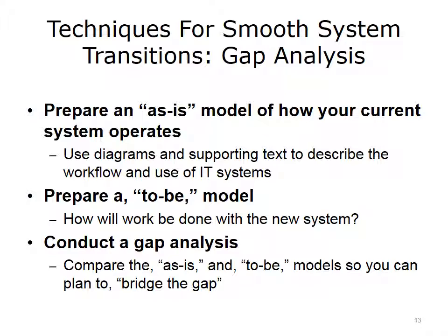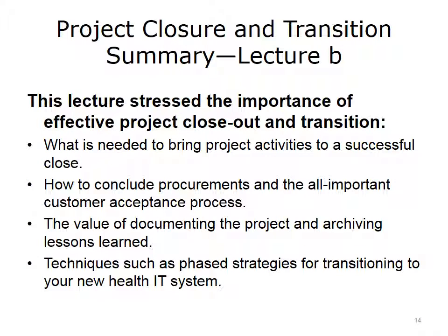As the name gap analysis suggests, the purpose of the gap analysis is to compare and contrast these two representations, the as-is and to-be representations. For example, in a gap analysis, you can help to address questions such as, how will you get from as-is to to-be systems? What steps will you take? In what order? What does that imply for the training that will be needed for the staff? What stakeholders must be notified and involved to have a successful implementation?